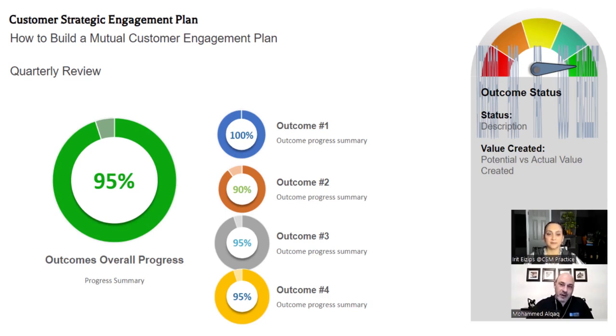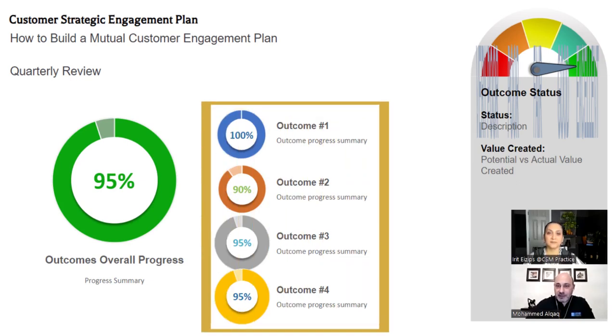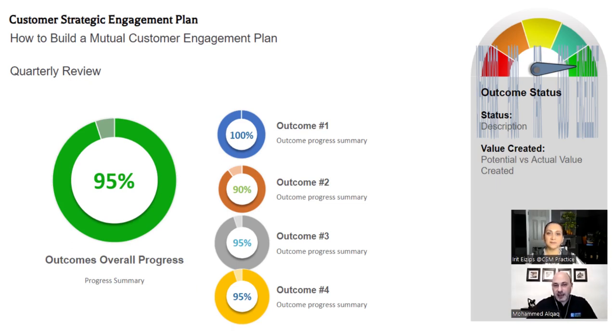For me, this is how I put my methodology within this context: split the initiatives or the desired outcomes into small chunks that we can deliver as much as possible within a month or within a quarter, that can be considered a quick win. We deliver this and we achieve this value. We deliver this and we achieve the other value. So if there's a big chunk, then it will take 3 months to be delivered. There is no quick win in 90 days. But if you deliver 5 small chunks in 30 days, that's a quick win.